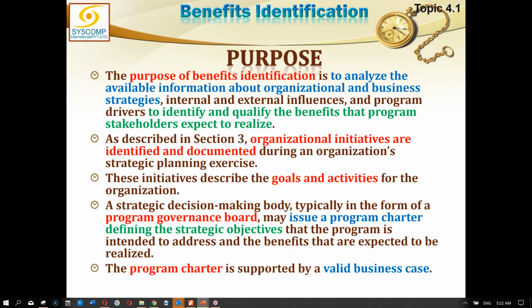But our strategic justification can supersede any technical assessment or financial assessment. You may go for a decision where strategically you think that it should be done, and maybe technically it is not feasible or financially it is not feasible, but strategy takes precedence. Similarly, technology takes precedence over the financials. But if there is no restriction of strategy or technology, then the ultimate decision is held by the financial decision.